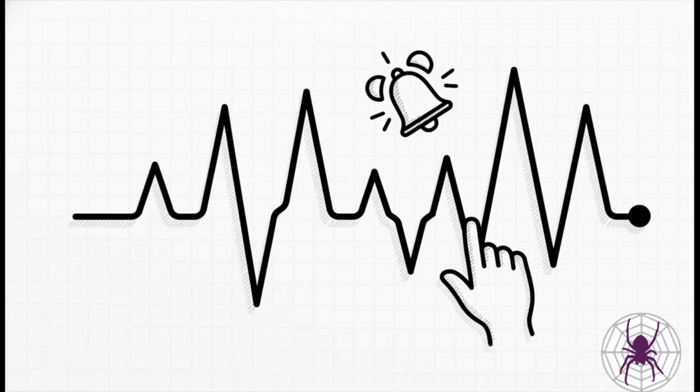You really have to think of this trend line as the project's heartbeat. If it starts to decline, that's your clear, data-driven early warning. It's telling you that your contingency reserves are being eaten up faster than planned and that management needs to think about corrective action before you're officially behind schedule.